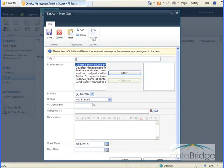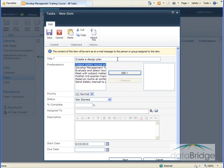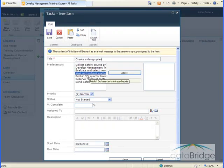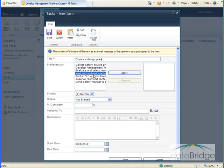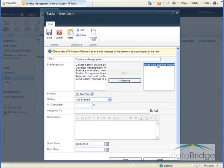The second task is to create a design plan. Now before Teresa can create the design plan, she has to finish meeting with all the subject matter experts. So to indicate that for this task, I would select that title of that previous task, make that a predecessor, selecting the title, click on Add, and it adds it to the box on the right.